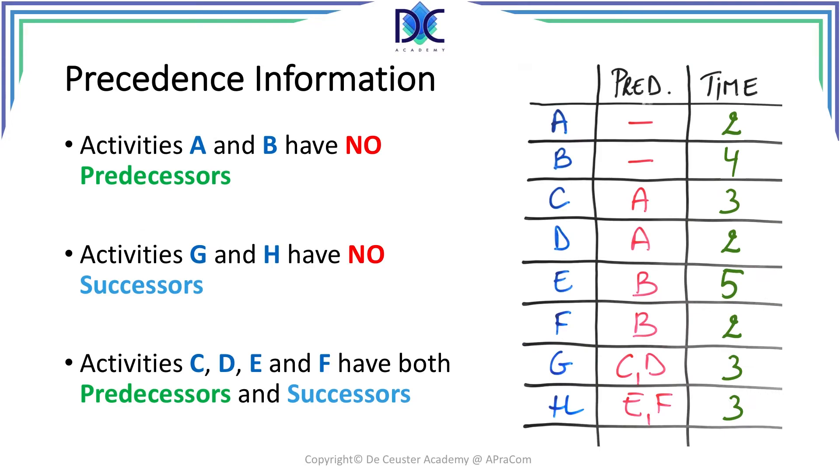So let's have a look at the precedence information. It is typically represented in a table like you see at the right. We have in the first column the task identifiers, in our case just letters of the alphabet. Then we have the information about the predecessors, and the last column in our example is the time, the duration of those activities.